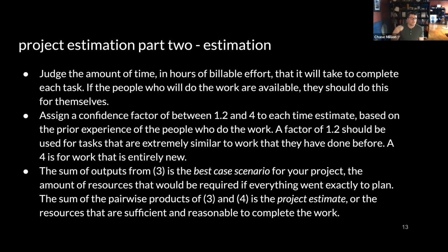So let's say we're baking a cake. I think it will take me 2 hours, but I think I've baked 3 cakes in my life, so I'm pretty sure I can do it, but it might get a little hairy. I'm going to assign that a confidence factor of 2.